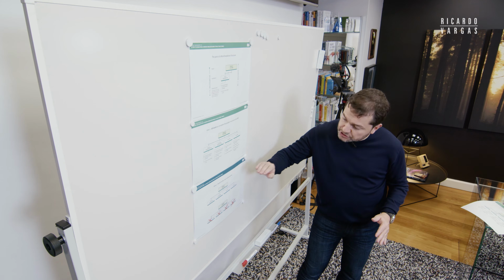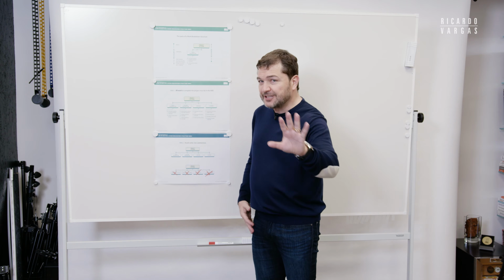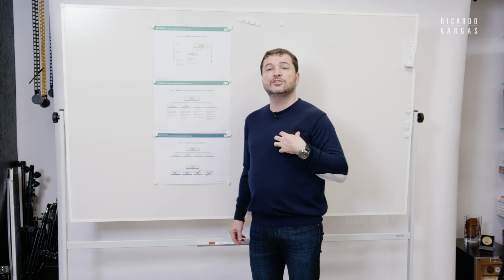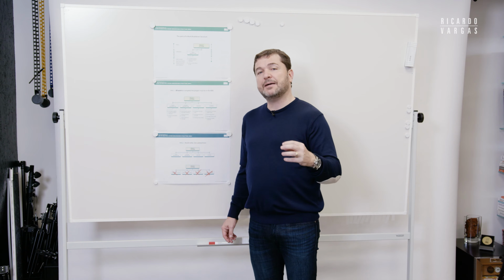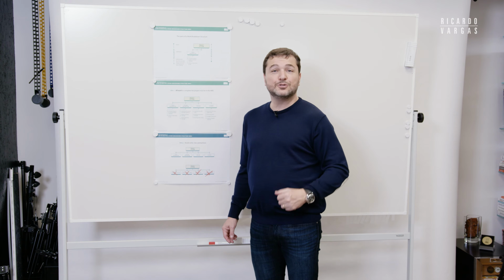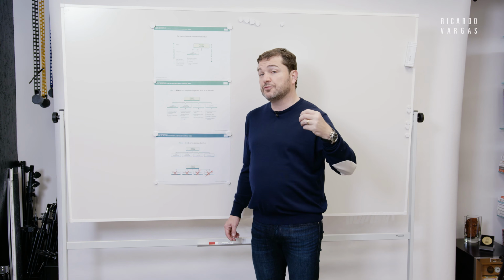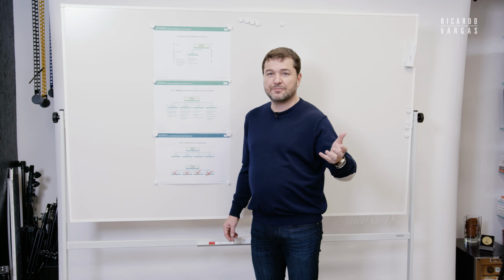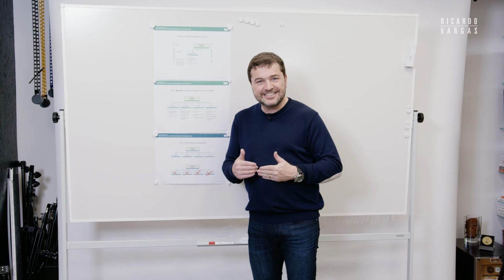Use always substantives. And I know, even for myself, this is not a tip, okay? But I always write the items of my WBS chart in all caps. Why do I do that? Because most of the software you use for normal scheduling, like Microsoft Project, does not divide what is a task and what is a WBS element.